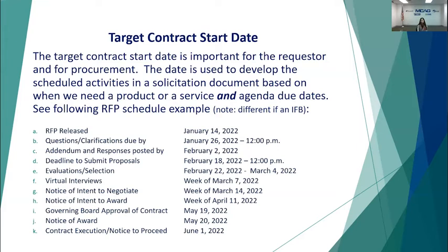Again, this schedule is for an actual procurement which we expect to switch contractors for, and it is likely that we will have a new contractor, somebody we haven't worked with, with a little bit of a complex scope of work. We are building in a month period of time there to go back and forth with their team and their legal counsel, and back and forth with our team and our legal counsel, before we wrap up that contract. I mentioned above that we work on these dates based on agenda due dates.